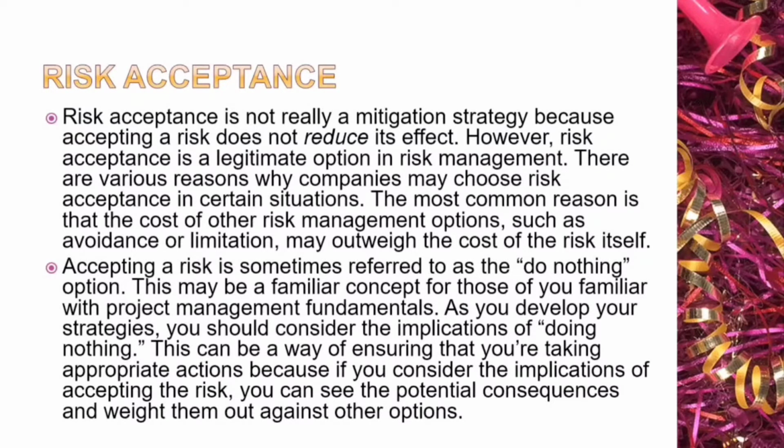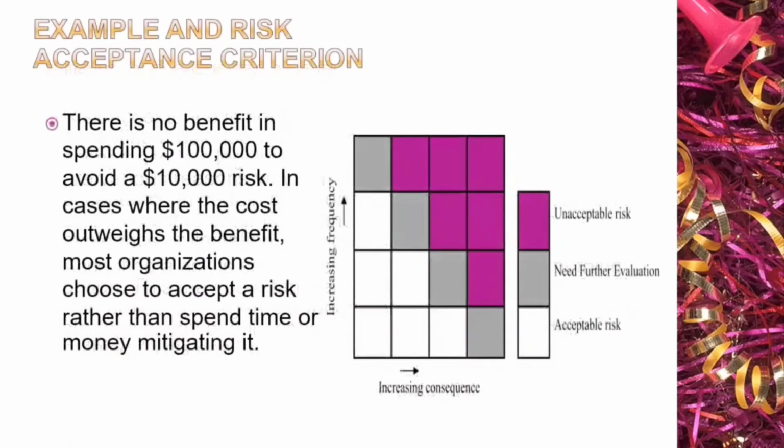Risk acceptance is when the company has no other choice. It wants to accept the risk. For example, in an organization, the company will not spend $1 lakh in order to avoid a risk of $10,000. In this case, the cost outweighs the benefit for most organizations, and they only have the option to accept the risk, or they will not spend extra money in order to avoid that risk.